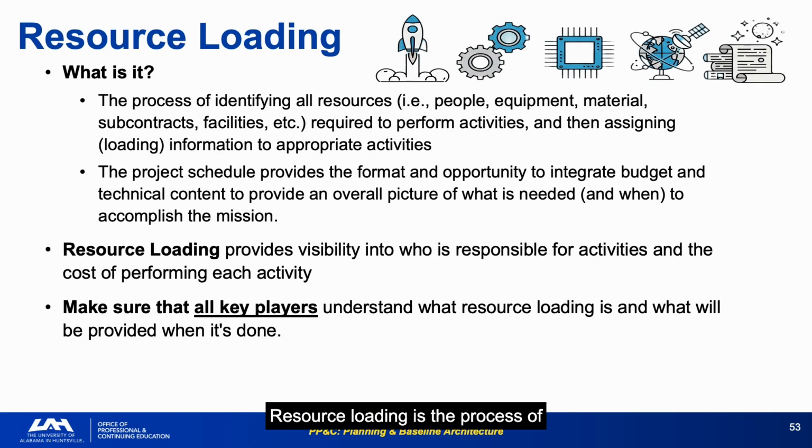Resource loading is the process of assigning all required resources, people, equipment, materials, subcontracts, facilities to schedule activities so that the schedule reflects what it will actually cost to execute. Bill's note: the debate over what resource loading means continues. In the JCL world, resource loading specifically means cost loaded. Know what your program's definition is and what your contract requires.